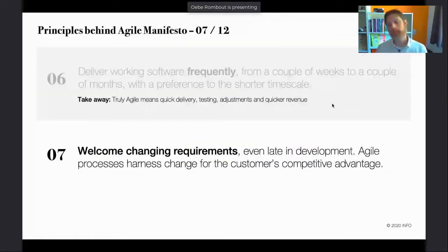So I think that especially with new teams, that helps a lot. It prevents you from pulling in too big chunks of work, because with 2-week sprints you won't be tempted to take in too much work, and with a 3-week sprint you can go too big, and then you can lose a whole sprint, and it's just a waste of the development time.